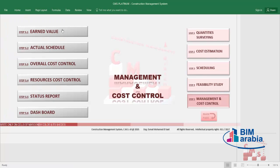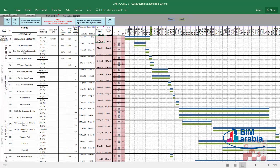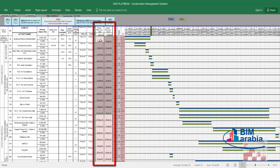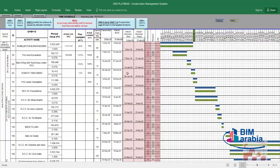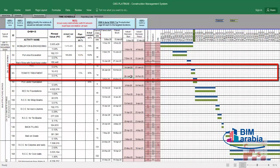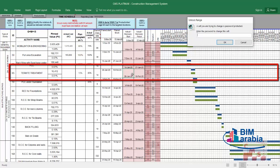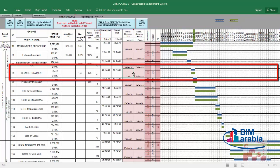Let's go to step 2 of management: the actual schedule. We need to insert whether we finished activities on time or not, and what the actual start and finish dates were. We go to the actual schedule section and insert using the CMS password. According to our project, the termite treatment instead of starting on 28th January started on 31st January — we'll insert that now.